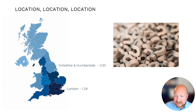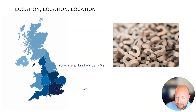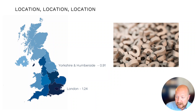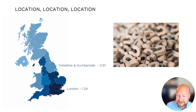Is there open access, or will you have to navigate a concrete delivery through the narrow streets of London during rush hour? In a refurbishment project, will the building remain partially occupied? What site deliveries are possible, and will the location give rise to increased delivery charges? Are you working on an almost identical project to last year but now a major infrastructure project in the area has snapped up local labour forces? Will the project be completed through a pleasant spring and summer, or a miserable autumn and winter? These are all the types of questions that, as you progress through those stages, you might need to translate into cost data.